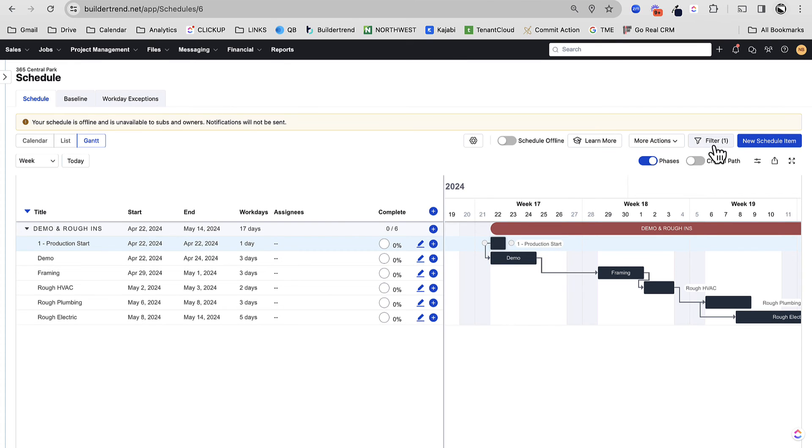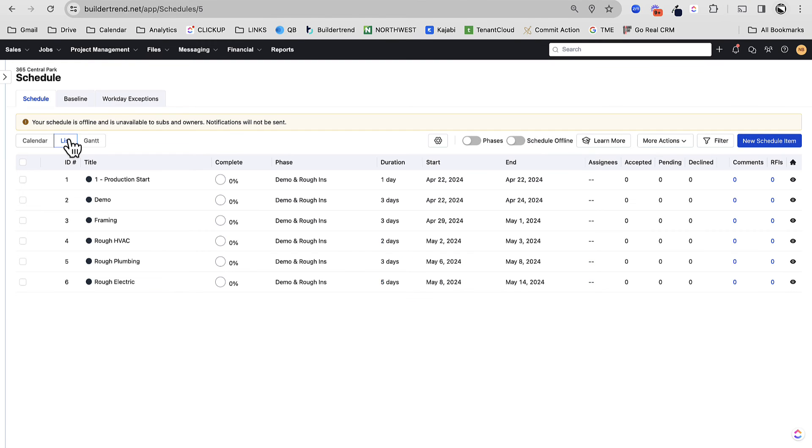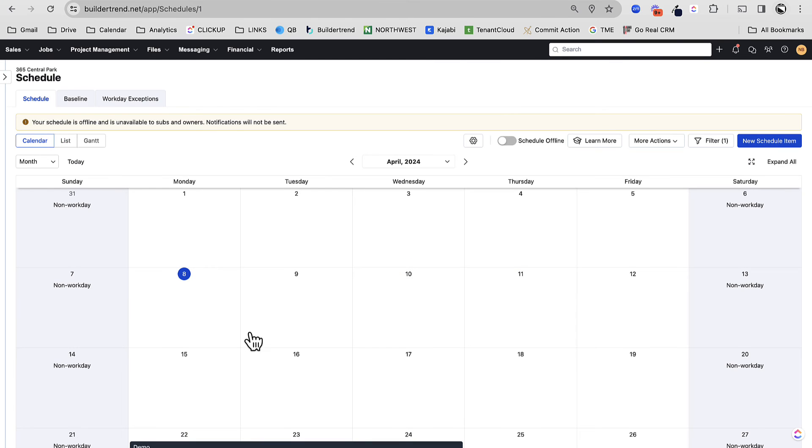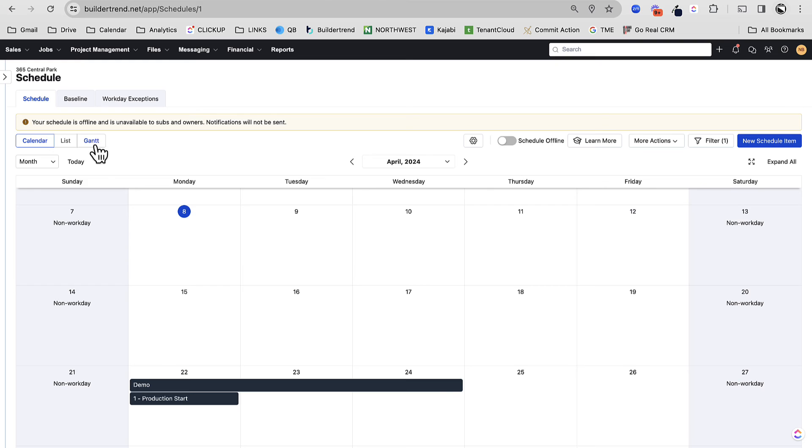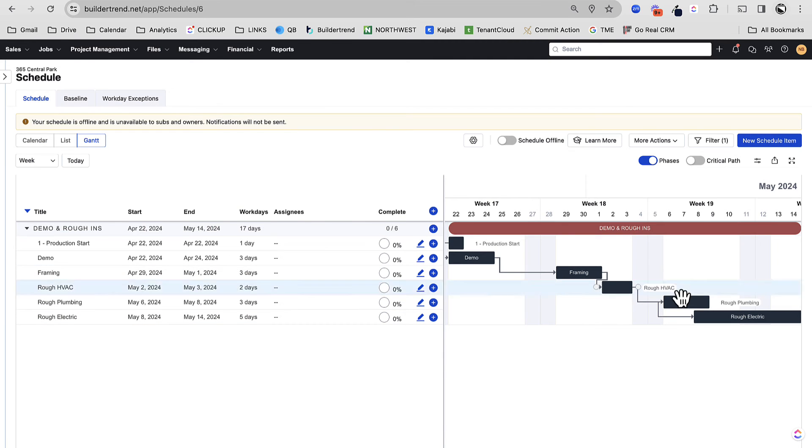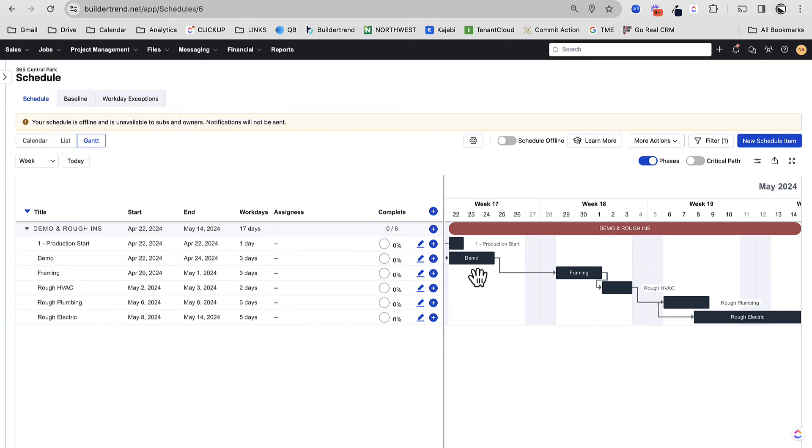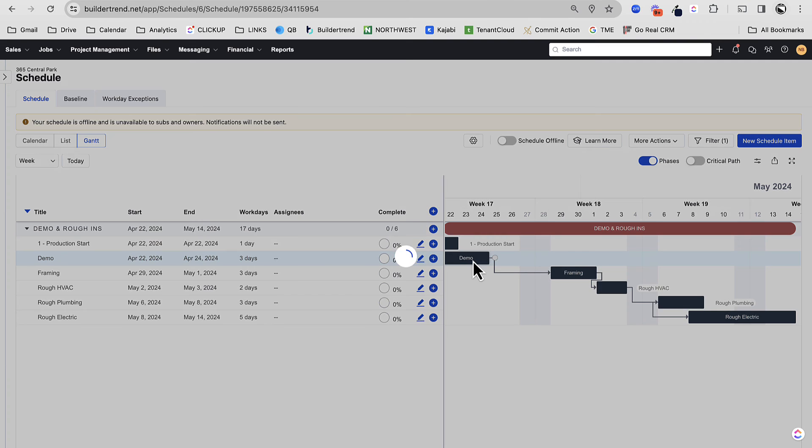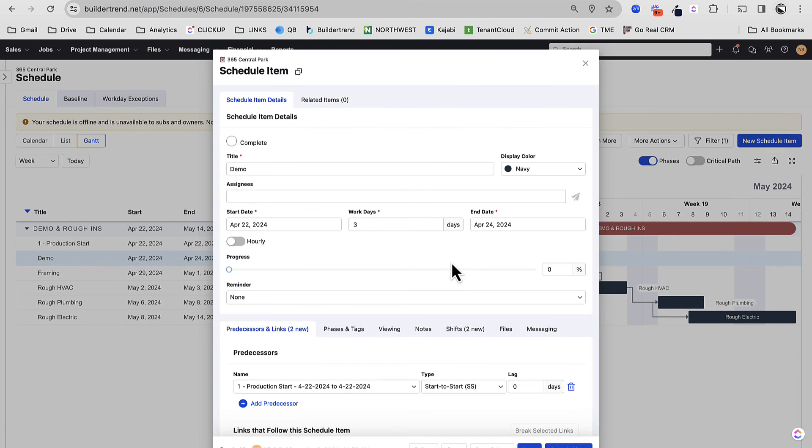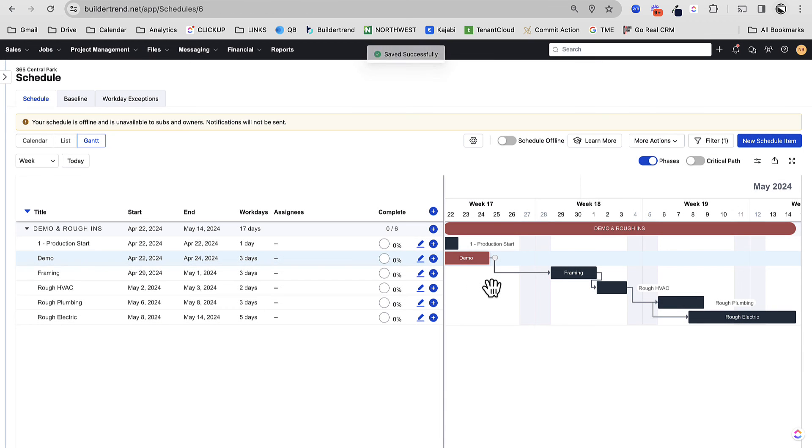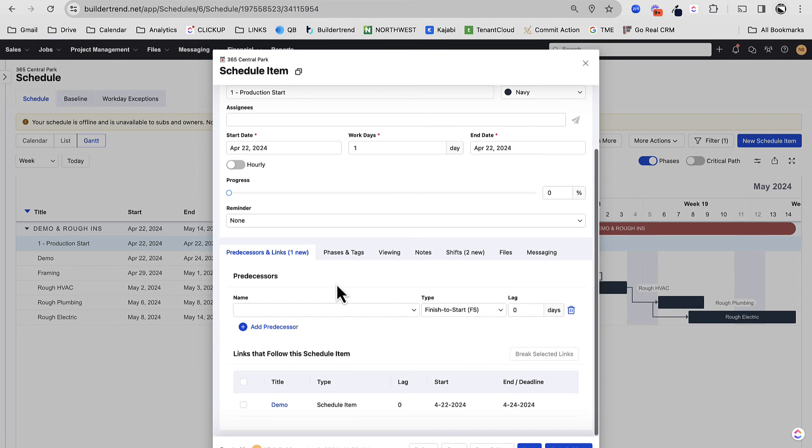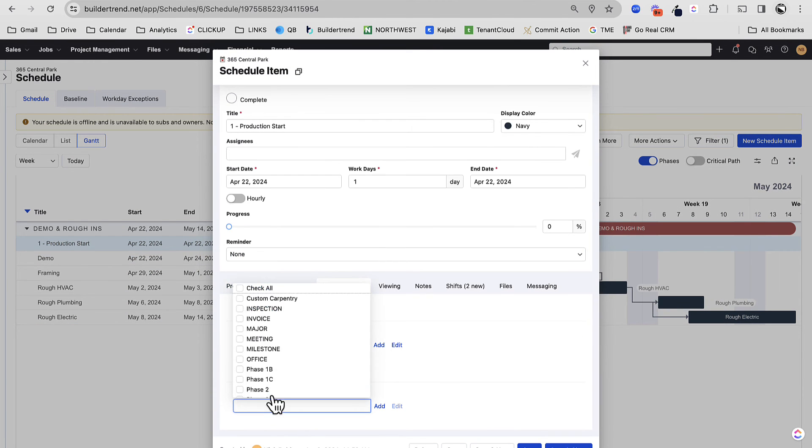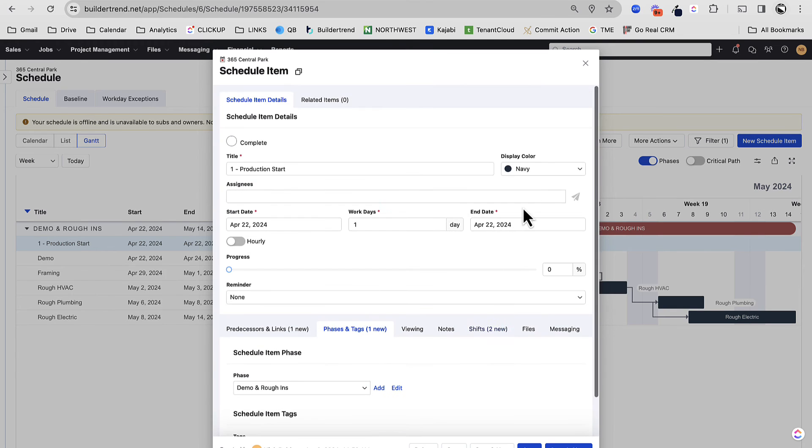And we can filter as well. That's not too useful yet. I'm going to show you tags in the future, in which case that will be really useful. We'll go to list. I can see things here and now I can see on my calendar as well. Right now I've kept everything the same color. That's up to you how you want to work that. What I tend to do is I tend to color my tasks based on what type of tasks they are. So if it's just like a standard task within that phase, I'll probably color all of these to be that same color as the phase. So this phase happens to be rose. And then what I do with something like this, a production start, this is kind of a milestone. Maybe I'll tag that as a milestone and maybe those colors stay the project color.